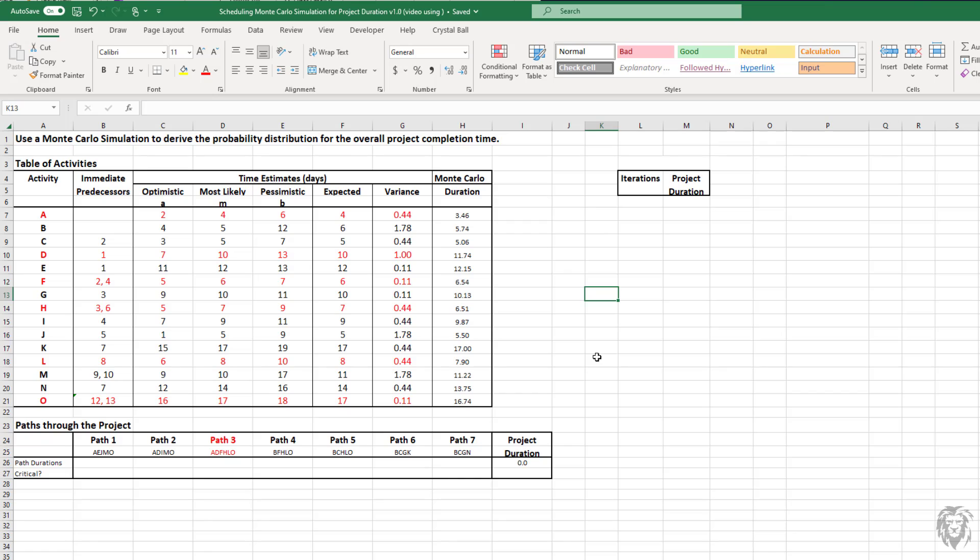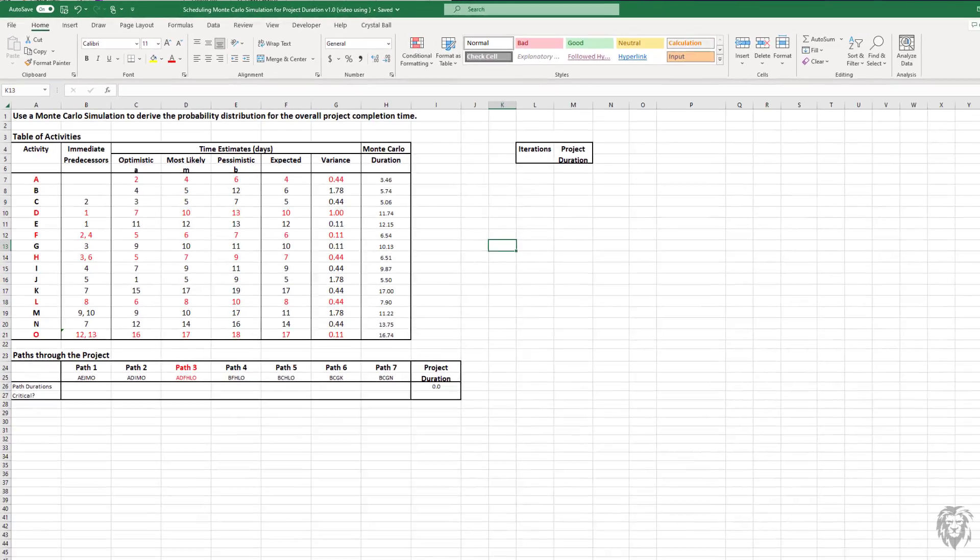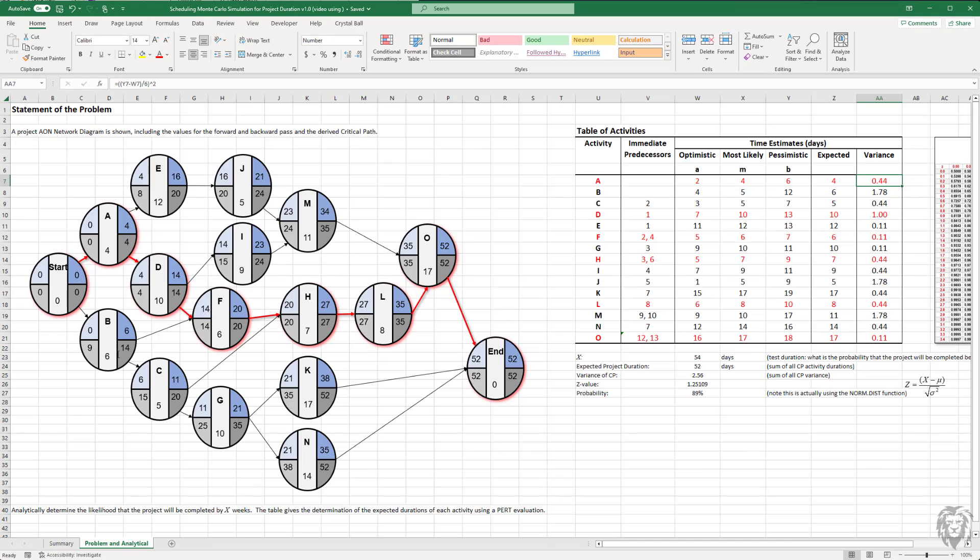To get to where we want to go, particularly if we're going to take into account the convergence bias, we're going to look at all the different paths through the project. I've come up with seven possible paths through the project. If we go back to our Activity node, you can see A, E, J, M, O, A, D, I, M, O, et cetera.